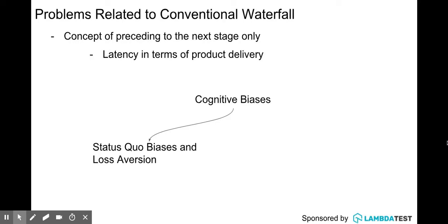Now, the second thing in cognitive bias is the planning fallacy. According to this, people often tend to be naively optimistic when providing ETAs for a product delivery by assuming everything will run in an ideal manner. Now, there exists no perfect planning for any phase. Nobody can give you the assurance that this phase is 100% flawless. As humans, we are all bound to commit mistakes, and what becomes problematic is when we realize a mistake of phase one just when we are about to reach the product delivery stage.